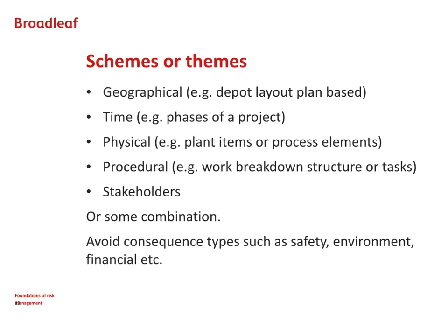We can also think about timing. So, for example, if we were looking at a project, we could use a structure based on the phases of the project, from concept through to pre-feasibility, feasibility, and then execution. If we were concerned with risk assessment associated with a work activity or a written procedure, we could use a work breakdown structure as the basis for the key element structure.